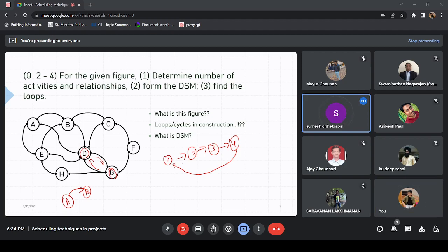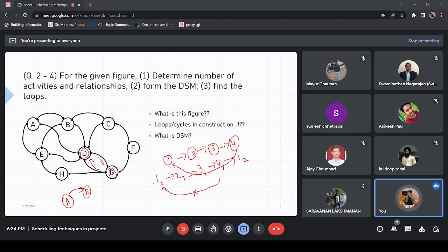Yes, sir. But what is happening is that if you perform the first activity for the first lift, then the second activity for the first lift, then the third activity, and the fourth activity for the first lift, you are not going to do the first activity for the first lift again, right? What you are doing is actually the first activity for the second lift now. So this is not cyclic now. You are not getting back, you are moving forward actually.